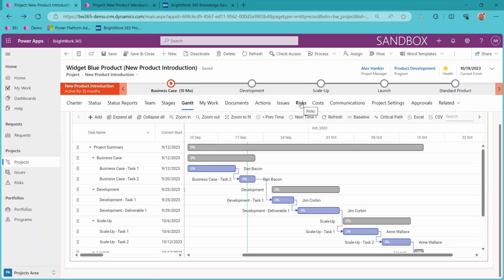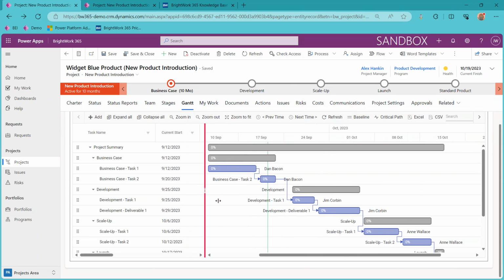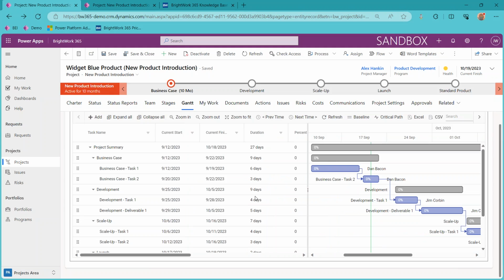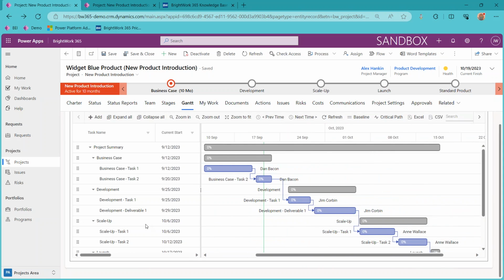The reason why I'm mentioning we do that before we baseline is because not every task may have been thought through entirely when we were doing the brainstorming for the WBS. It could even be considered fun in a way to sit around a table with your team and brainstorm for what could possibly go wrong with this project to make our duration estimates incorrect, or to maybe identify a task or two or 10 that need to be added to our Gantt to account for some sort of a risk.